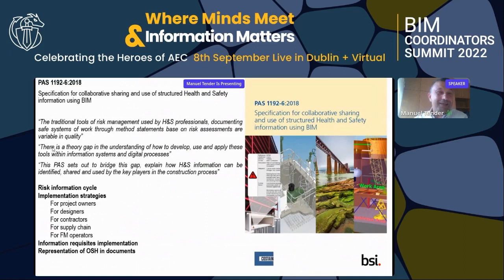The first thing that I would like to talk about is the normative document that the UK has launched, the PAS 1192 Part 6 in 2018, that specifies the collaborative sharing and use of structured health and safety information using BIM. The UK was a pioneer. It was one of the first countries directly taking this approach to the health and safety area.